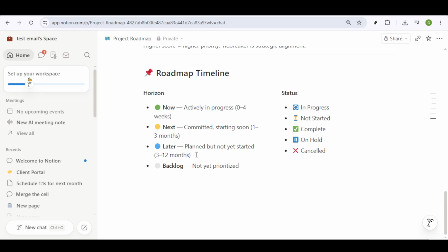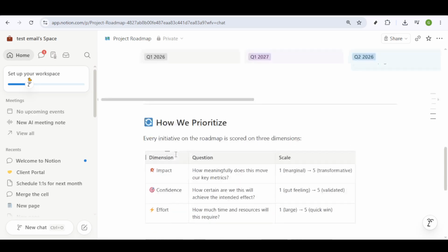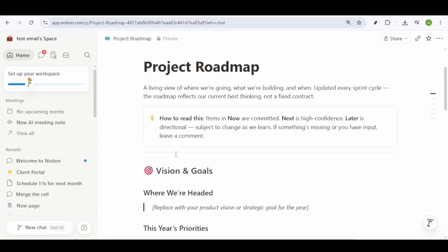Assign start and end dates to each project so they appear accurately within the timeline. This visual setup provides a bird's eye view of all your projects, making it easier to spot overlaps, manage deadlines, and adjust plans as necessary.